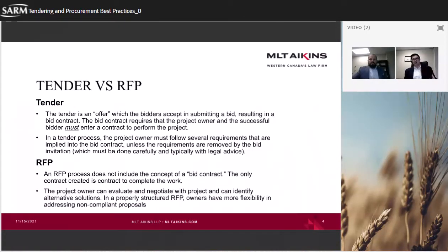The contractor can't come back and say, thanks for selecting me as the winning bidder, but that's not the actual price, I forgot to tell you it's actually 20% more. By giving that tender price, they're accepting that they will enter the contract under those terms.